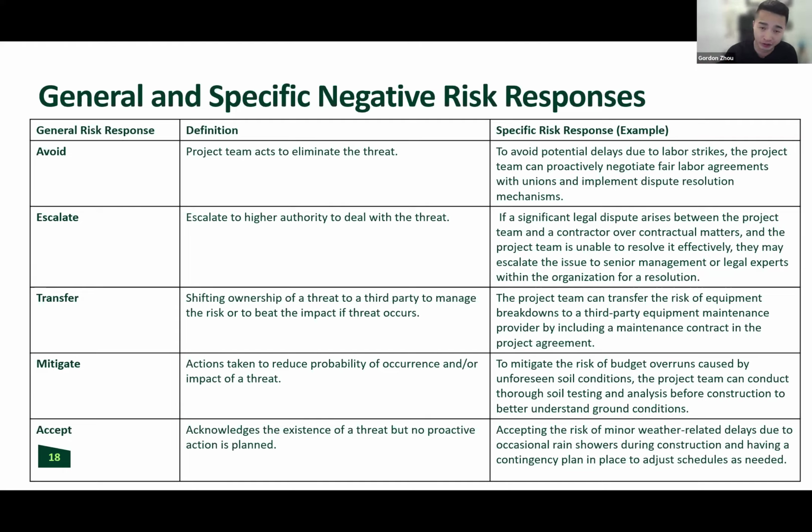Going back to what you learned earlier about analysis, that's where that comes in. You may have a risk that is high likelihood, high probability, 25, a high score. That is worth a multitude of different responses. I want to transfer, I want to mitigate, and I want to escalate.